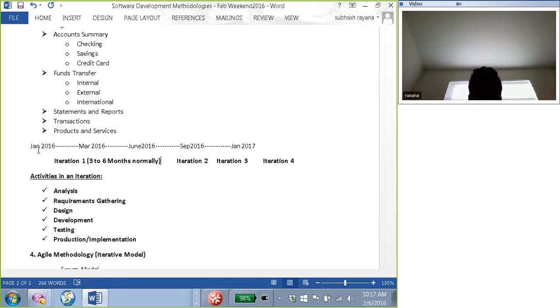It depends. Depends on at what point are they asking, and what kind of changes are these? What is the impact? Because we have a strict window of 3 months, assuming that it's a 3-month or a 6-month iteration cycle. Depends on how much we can consume. I mean, iteration 4 has been planned in such a way, the 6-month window has been planned in such a way that we have no room to accommodate additional changes.